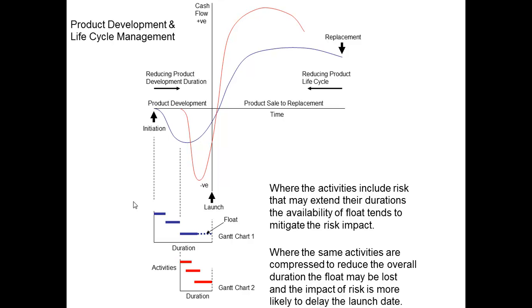In the previous diagram, what we were looking at really is this spend profile. Again, we're talking about cash flow over time, but here, rather than looking at the cumulative cash flow, which the previous diagram had, we're looking at the incremental cash flow. That is, if we were to split the time up into weeks, let's say, and we looked at the spend during each week, then the rate of spend will generally, in the product development, design and development process, speed up initially and then slow down.